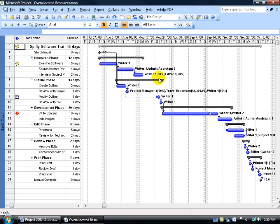Unless I decrease their units from 100%, as you see here next to this task, to half of that — 50%, or 4 hours for the writer and 4 hours for the editor. So if I increase that from 50% to 100%, I'm back to 8 hours, and if I go from 100% to 200%, I'm now at 16 hours, which is 8 hours beyond the typical 8-hour day. So that resource would be over-allocated.